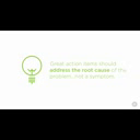Action items should address the underlying root cause that's causing the issue in the first place, not the result of that cause. In this case, the root cause was that the team wasn't clear about what was considered necessary for an item to be considered done, so quality dropped as the team rushed to meet their forecast. This action item doesn't address that root cause of having an unclear idea of what done means. It instead addresses the resulting effect of the team having to rush at the end. That's a very good point, Alan, adds Louise.